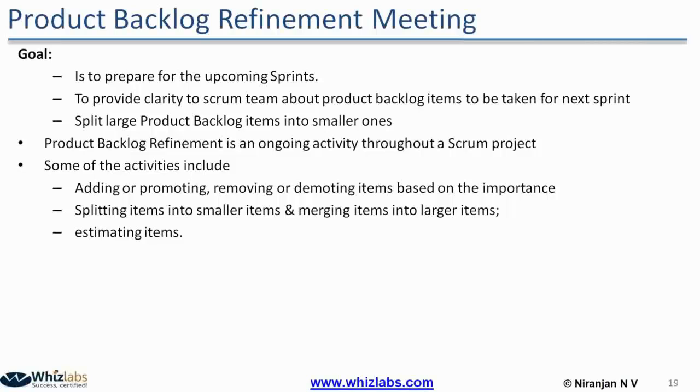If you don't do what I discussed just now, then the team will not be able to finish sprint planning. If sprint planning gets impacted, the sprint execution also gets impacted. In order to do all these things, the team should be very clear. That is why this product backlog refinement meeting is required. The pre-planning and refinement meeting can be the same. What I said is pre-planning can be a one-time activity, but refinement can be done at any point of the sprint.